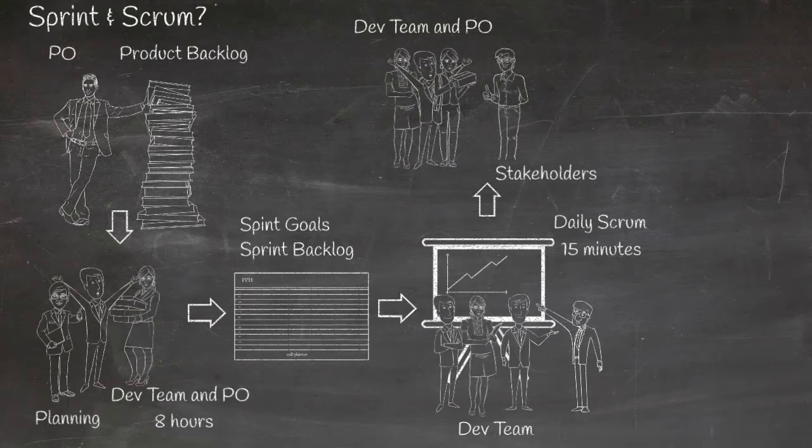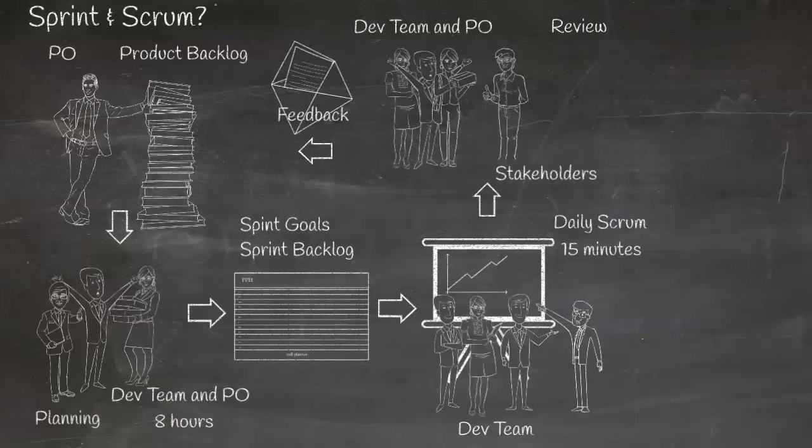As the sprint ends, the development team and the product owner meet the stakeholders to discuss the increment that the team created during the sprint. The outcomes of this discussion give the team feedback about the current status of the product. The feedback is accounted in the product backlog, enabling empiricism in the product development via the adaptation of the product to new information, to new challenges, and to changing business needs. This meeting is called Sprint Review. It lasts no more than 4 hours for a 1-month sprint.